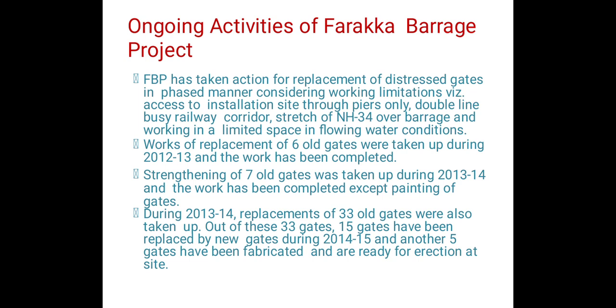Works of replacement of six old gates were taken up during 2012-13 and the work has been completed. Strengthening of seven old gates was taken up during 2013-14 and the work has been completed except painting of gates. During 13-14, replacement of 33 old gates was also taken up. Out of these 33 gates, 15 gates have been replaced by new gates during 14-15 and another 5 gates have been fabricated and are ready for erection at site.